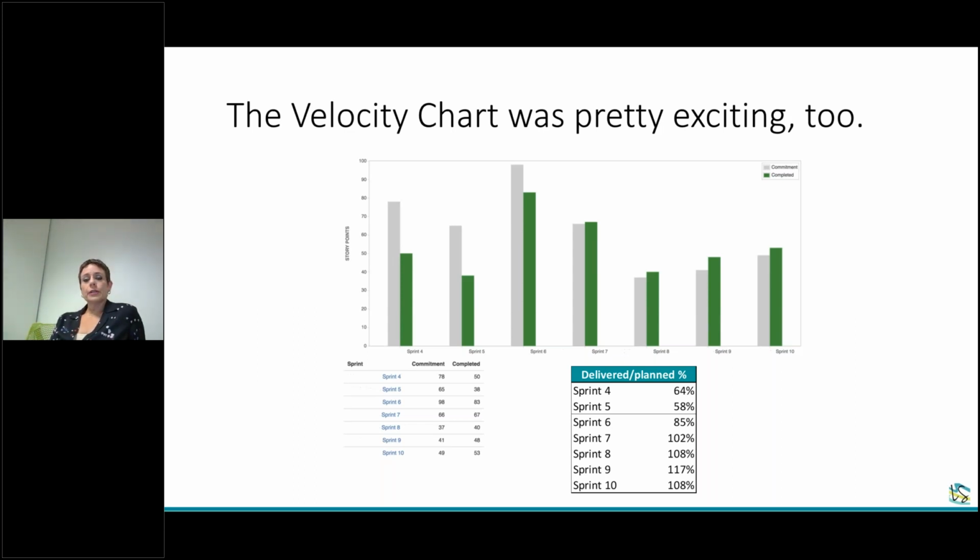All you have to do is, number one, make sure that all the work being done in the sprint is represented by a Jira issue. Number two, make sure that your Jira issue has story points on it. And number three, move your stuff across the board as it changes status. Everything else Jira does for you. One thing I will say, on the velocity chart, it's story points.